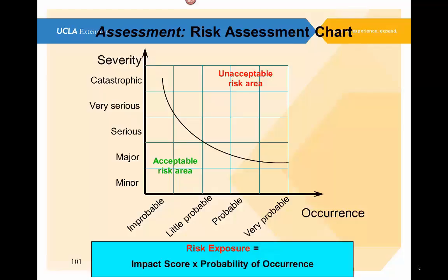Set this up not in lieu of quantitative measurements of the risk impact or the risk probability, but just as a qualitative pictorial view of how you would plot the risks that you're tracking, and how you would put them on this type of plot. And we look at occurrence across the bottom. That's the probability. This is broken up into 5 sections. They could be like 20% sections. And then going up the severity, that could be whatever your range of impact is. You could break that up into 20% elements, all the way up to the most catastrophic that you're currently monitoring.